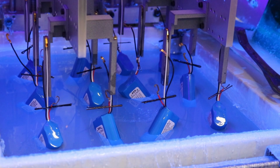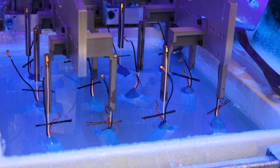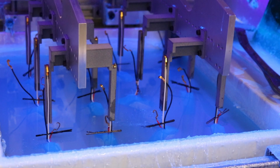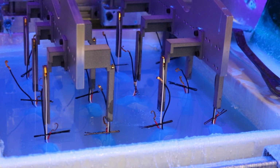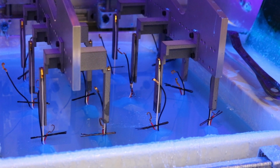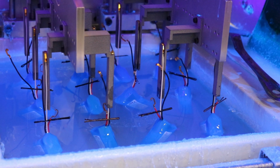If the battery pack is approved, we proceed with production, with lead time to complete typically being 10 weeks unless there are long lead items for the battery pack. If the samples need to be changed or modified, we will need to go through the proof process again with the updates prior to producing the next round of samples, following the previous timelines.